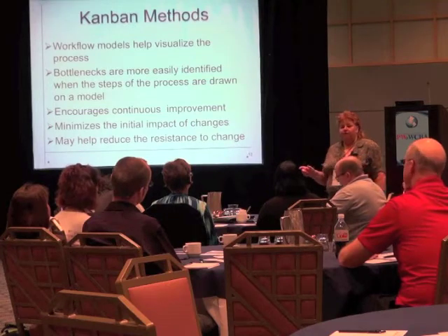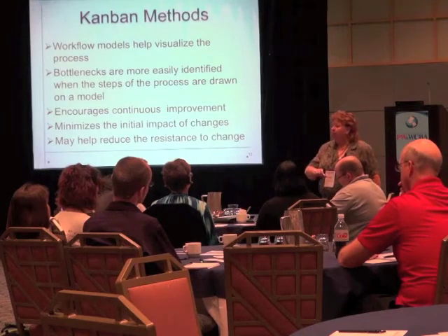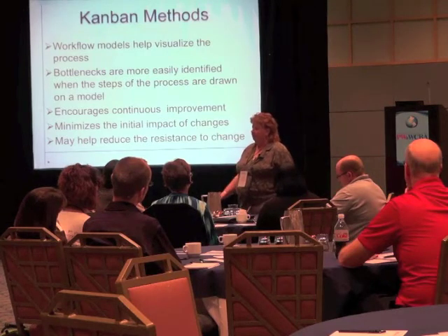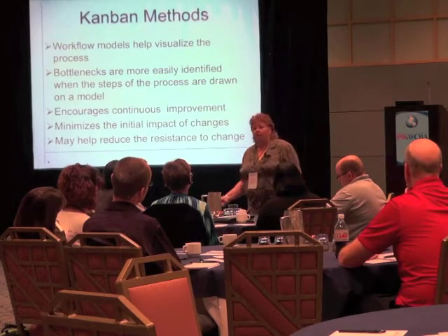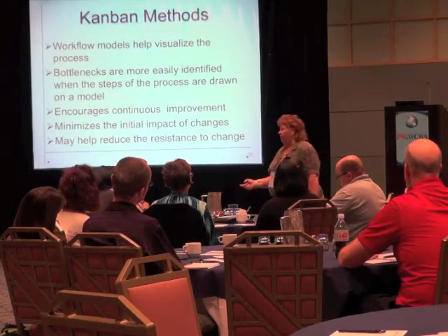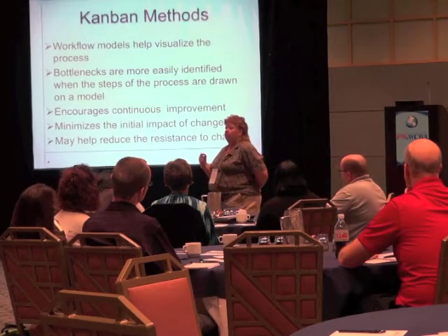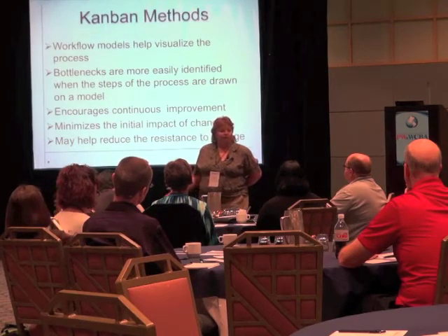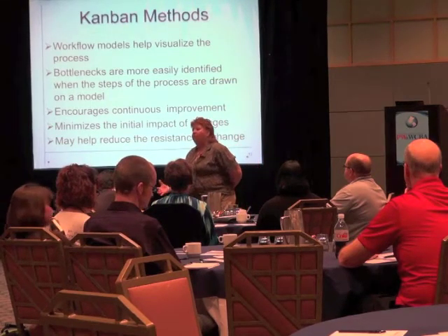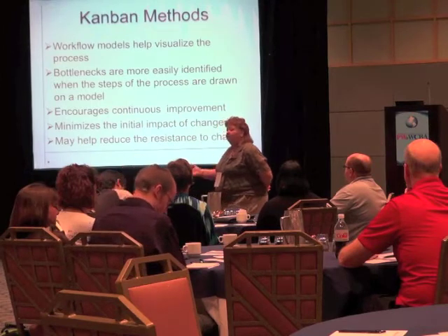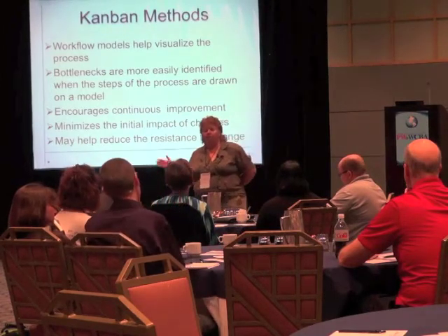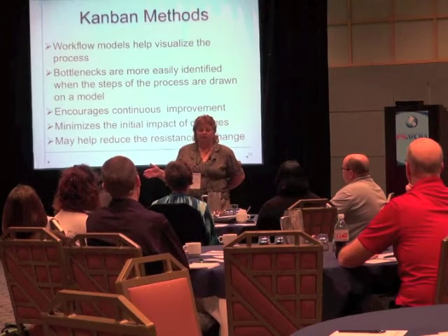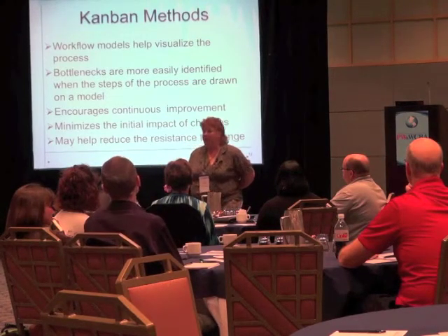Now, with work in process limits, the key thing is, if you change a bottleneck and you move it by changing a WIP limit, and you create a whole new, bigger bottleneck, move back. Don't be afraid to go back, it's okay. Always move towards better flow, right? And if once in a while that feels like you're moving backwards, you're really moving forwards with flow. And to me, until you get to a part where you've broken the flow model that you set up, you haven't finished tuning it. Not even close.